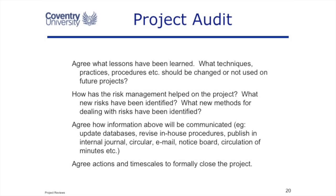So, lessons learned — complete that lessons learned document and circulate it around your organisation. Have a look at your risk log. What risks happened? Which risks didn't happen? What new risks showed up which you weren't expecting? This is good information for the next project. And then we need to update the company databases: the suppliers, the contractors, the risk logs, the lessons learned logs. We need to communicate what we've found. And then we can close the project.